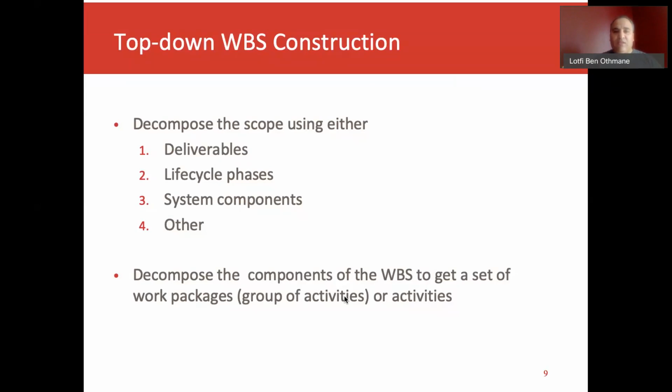It is possible that you have a different way of decomposing the system. One possibility is to use geographical areas. If you have a subsystem that is going to be developed in a location like Des Moines, another one developed by a team in San Jose, another team in India, another team in China, you might have the decomposition of the project at level 2 based on the geographical location of your teams.